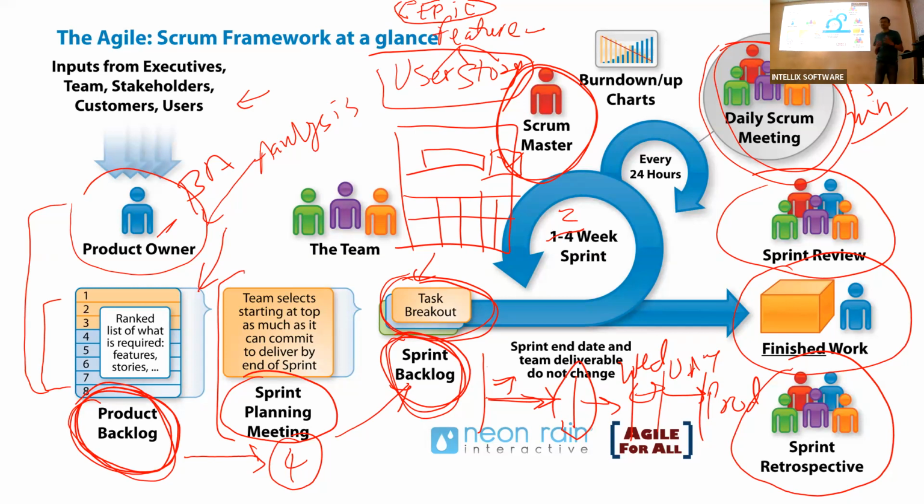Companies like Facebook and Microsoft deploy almost on an hourly basis. But companies like Nationwide might say, we will pick maybe the end of every month, and deploy 2 sprints' worth of work to production. So that's what the definition of done is. The definition of done for the story ties to that. So the UAT is complete, story is done at that point. It changes for every company. Generally the team works with the executive stakeholders and comes up with the definition of done, what it means to be done.